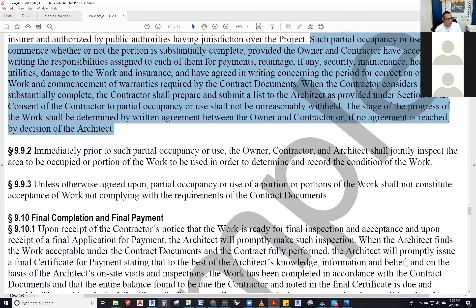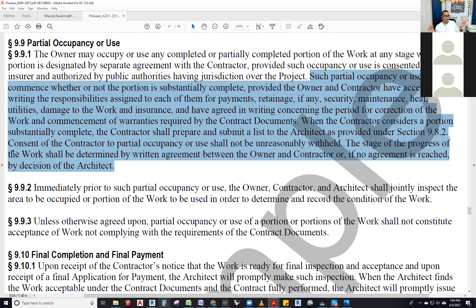The stage of progress of the work shall be determined by written agreement between the owner and contractor, or if no agreement is reached, by decision of the architect. For the owner to use the space, the contractor has to agree, and the owner has to pay for what's completed. If they're not in agreement, the architect will make the decision — because we are the IDM, the Initial Decision Maker under the contract. If they don't like that decision, they go to a claim and follow the dispute resolution method: mediation, arbitration, or litigation.